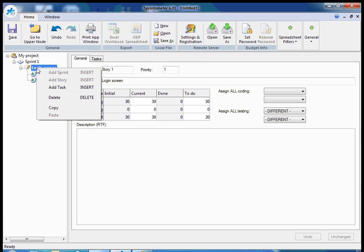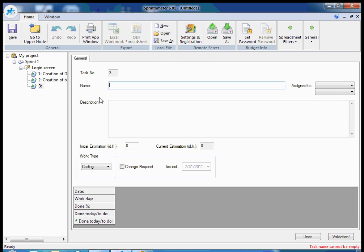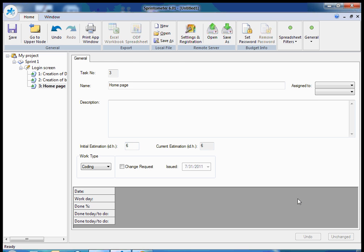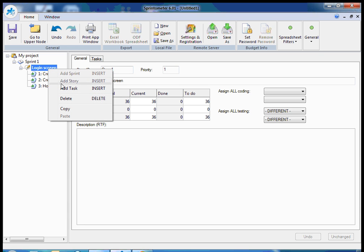And one more development task: home page. This is graphical user interface. Let's set 6 ideal hours.